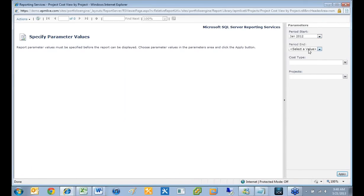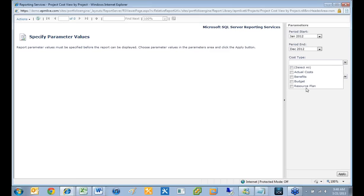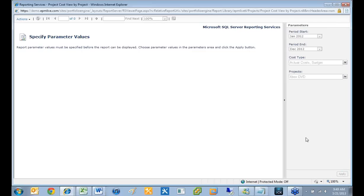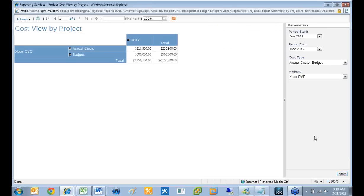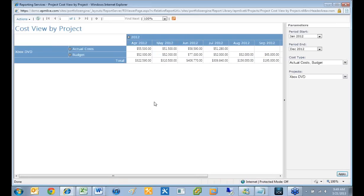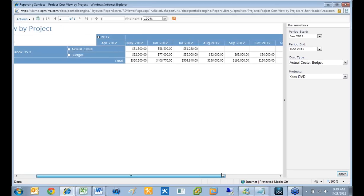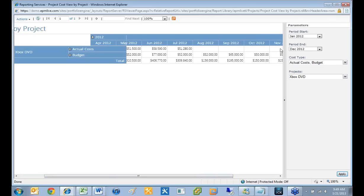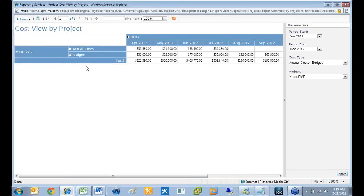I can pick different cost types — if I just wanted to look at budgets I could do that, or I can compare budgets versus actual costs by selecting both. I'll choose the Xbox DVD project and hit apply. Instead of a purely graphical view, I can look at the numbers and drill into the level I need. Here are my actual costs for 2012 and my budget for 2012. Maybe I want to drill in and see it by month — which month did we spend the most? Now I can see by month what my budgets and actual costs were and the comparison between the two. We can see here that the reason my actual costs are near my budget is because we're not done yet and haven't put in actual costs for all of these months.